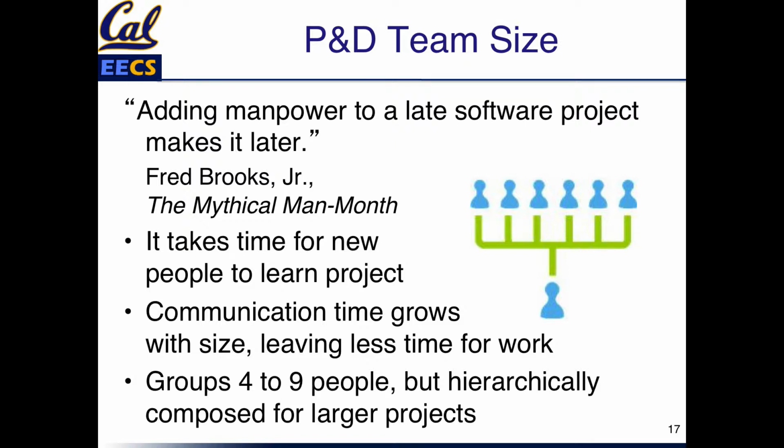And another famous thing from Fred Brooks, from The Mythical Man-Month, is that adding manpower to a late project makes it later. So this is a thing he observed, right? Well, we're behind. What are we going to do? We're going to add people. That's going to make it worse. What he said is when you bring new people on board, it takes time for new people to learn the project, so it takes a while for them to be useful.